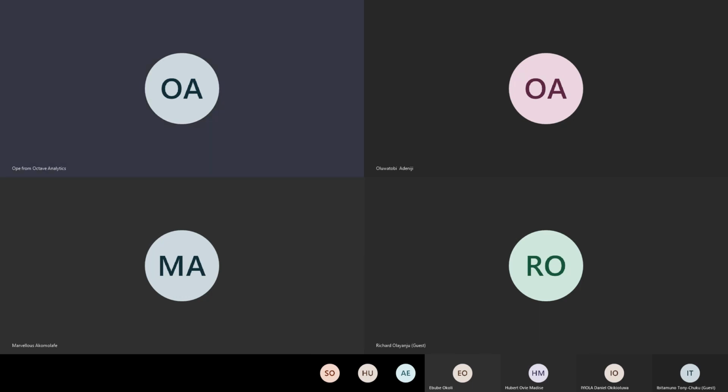So more or less focus on timeline, because whenever you bring up anything about cost or money, people will usually first throw a gloomy face or push back. So you don't want to start with cost. Just say, don't worry, we can handle this for you, but we'll need an additional timeline. Then you put the timeline towards the end of the project. If because of that additional request the project is extended, then so be it. They have to pay additional cost. You understand? That way, you're not positioning additional cost to them, but additional costs surface because of the addition. So that's a way of handling it.